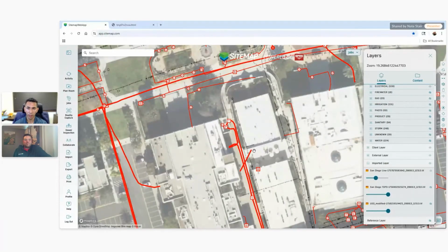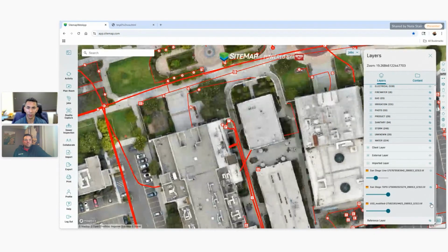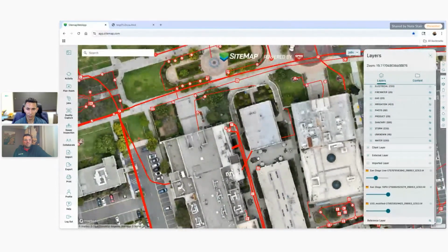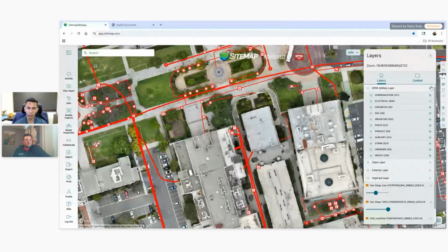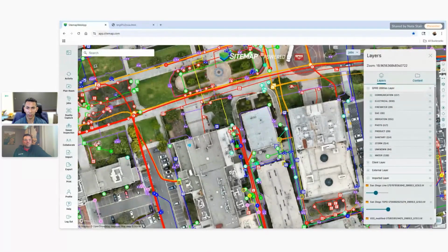So that was something that we were able to sort out kind of on the front end, because the building's currently occupied with faculty members, so I can't just go in there and start jackhammering through the concrete to look for the conduit. So that was something that was pretty helpful and kind of cleared up a question on the front end without having to do any destructive demo.